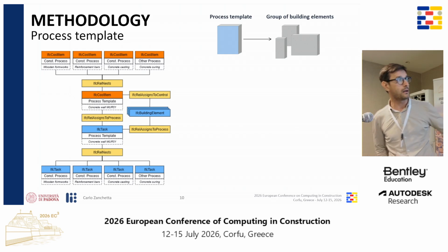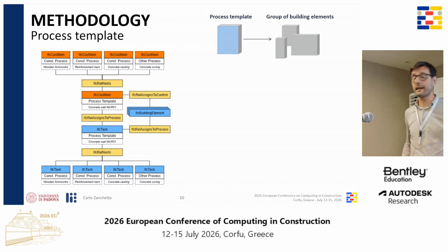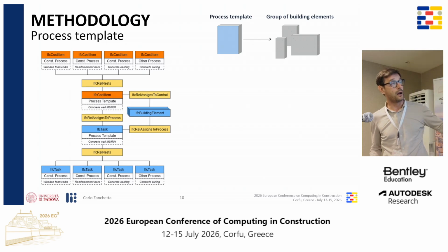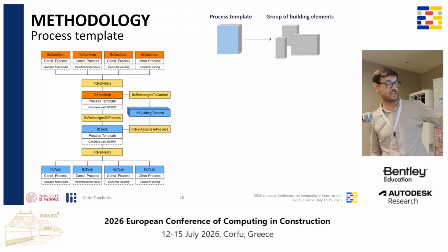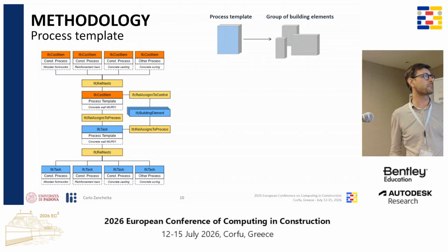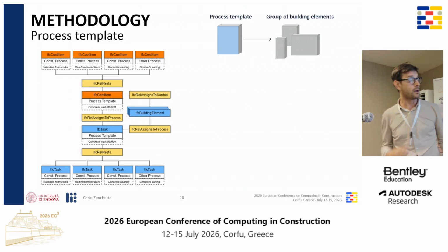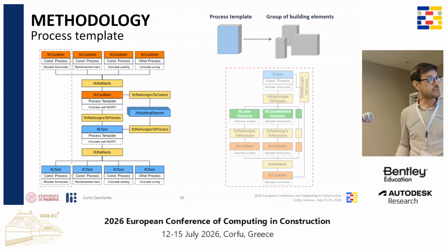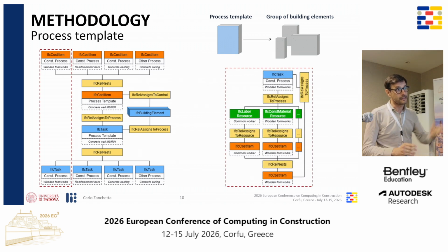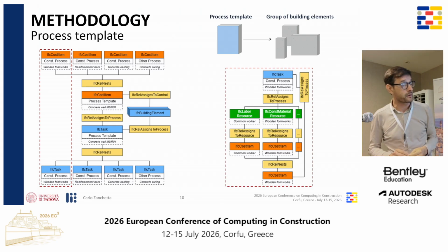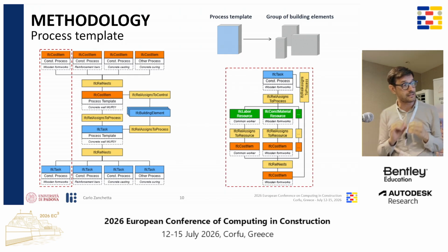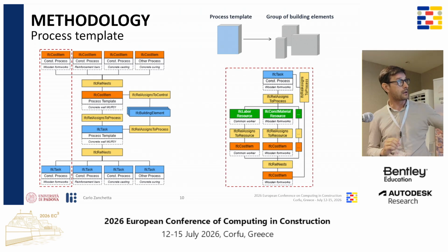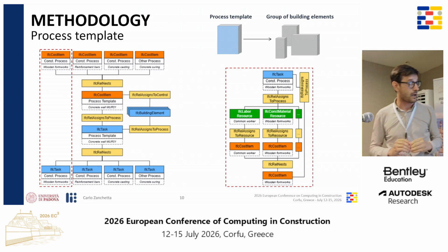On the other side, we assign throughout the assign to control, what we already stated when we analyzed the cost estimation, so the 5D discipline, looking at cost item. Again, a cost item can instantiate multiple cost items. So the stepping stone, the missing dot, is, as stated even in the previous presentation, the construction resource. Construction resource is the linking element that can help us connect the IFC task with the cost item, okay?